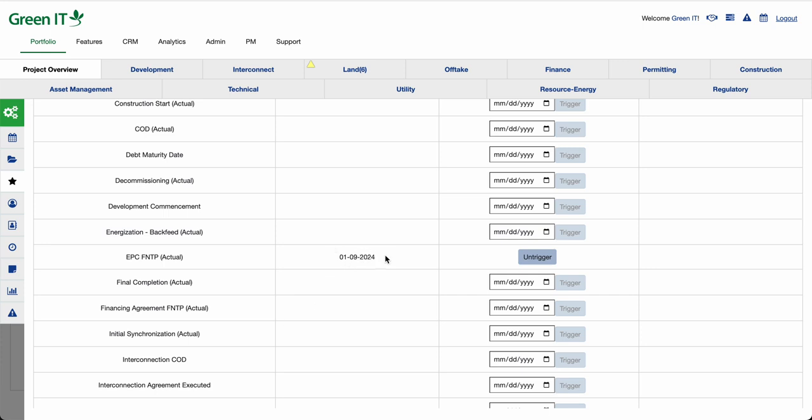And if I had compliance items that were associated to this milestone, they would be recreated with the new start date. So basically, the rescheduling of the compliance items would take place based on the save of my dragging the milestone around.